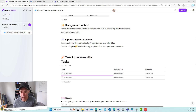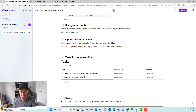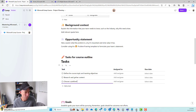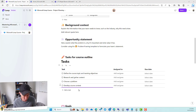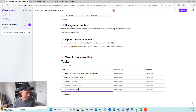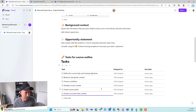So let's add a few tasks. The first one is going to be 'define the course topic and learning objectives'. The next one will be 'research and gather the content'. We'll also add 'choose the platform', then 'develop the course content' after we've chosen our platform. Next we'll add 'create the course assets', and finally 'produce and edit the video content'. We'll just leave it at that.